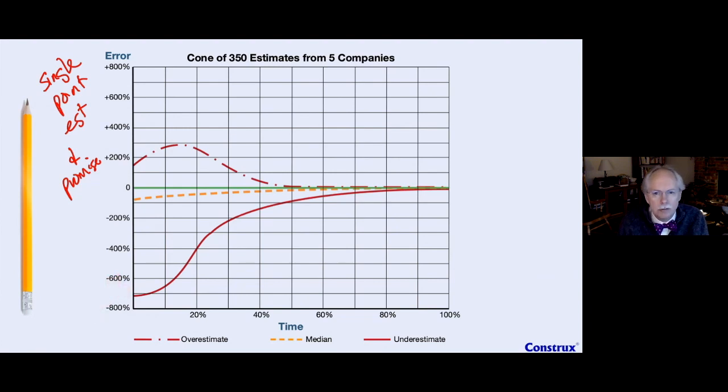Just a huge amount of underestimation on these things. That was not uncommon. He actually got rid of the outliers, but we're seeing 400%, 200%. That's fairly common as underestimation here. Occasional overestimation. We had a few at the beginning. We saw about 120, 150%, but most of it's down here because the median is below the line.